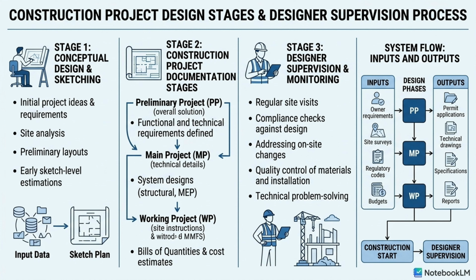Stage 3 is designer supervision and monitoring. During construction, designers conduct regular site visits, verifying that the work complies with the design. They address on-site changes and ensure that all materials and installation meet the specified standards. If technical issues arise, they assist with problem solving, helping to keep the project on track and in line with requirements.